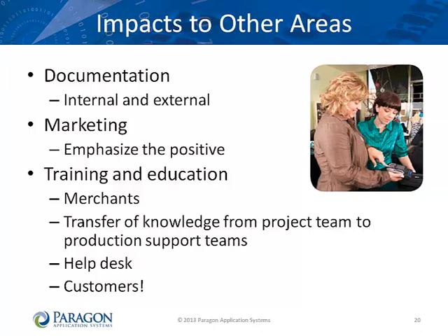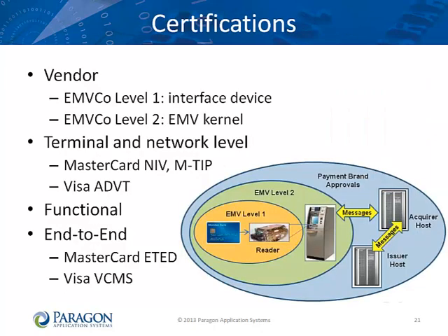The project team must be able to transfer all of their hard-earned EMV knowledge to the production support team. The help desk will need to be trained to handle new types of questions. There are many certifications to be performed. As we mentioned earlier, you need to make sure your terminals are certified to be EMVCo Level 1 and Level 2 compliant by the vendor. It is the acquirer or terminal owner's responsibility to perform terminal level and network level certifications.